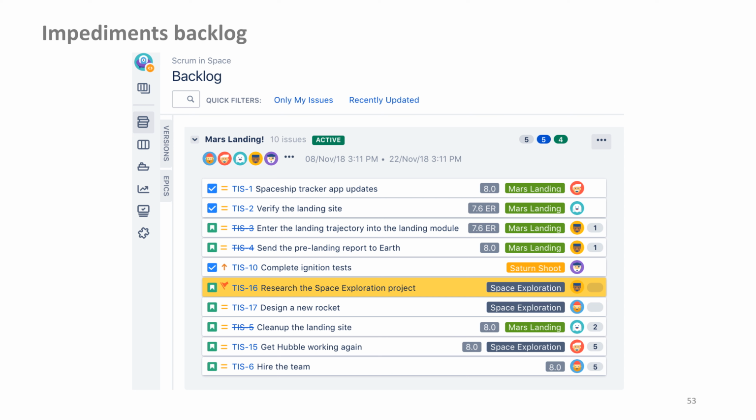Scrum Masters have the task of making this visible at a higher level and ensuring that these impediments are removed. To avoid misunderstandings, the Scrum Master is not the one who has to fix all the impediments, but by definition, they have the responsibility that they are fixed by someone.